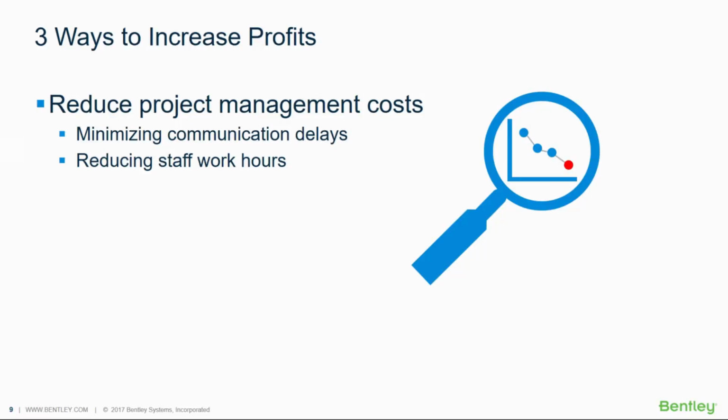You also want to make sure that you are minimizing the time that your staff is working on the project. And by setting up automated construction communications for processes such as RFI reviews and submittals, you can save hundreds of work hours. On a recent project in Guam, GHD estimated that their construction management system saved them approximately 800 hours just in managing RFIs and submittals within that system.